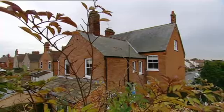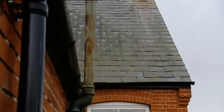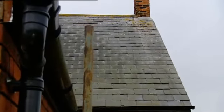Just one area that maybe you cut a corner too far, and that's the roof. Bloody roof. About that roof. And the point is, it will come up on a survey, and therefore you will either have to do the roof or probably take money off your asking price. If I can't actually be bothered to go back to doing it, then I'll just take less for it. This is one of Mike's cutbacks which won't pay off, and it will affect his final asking price.